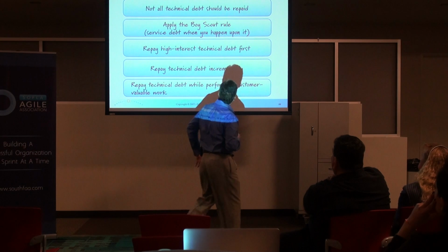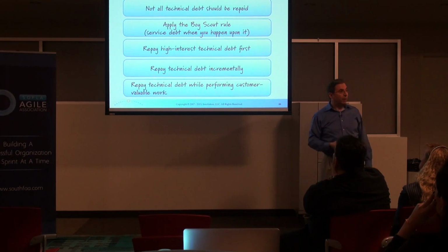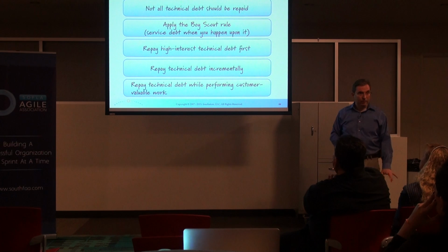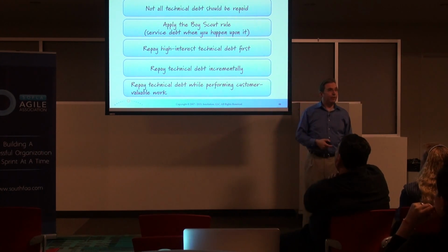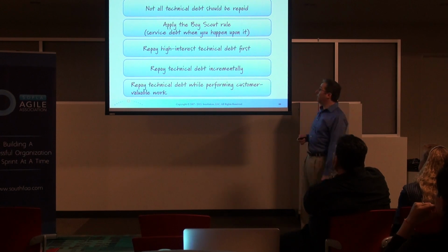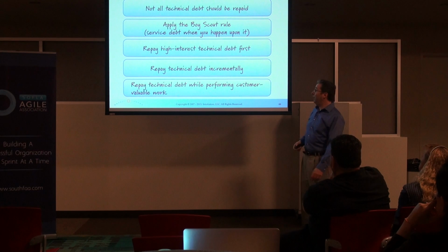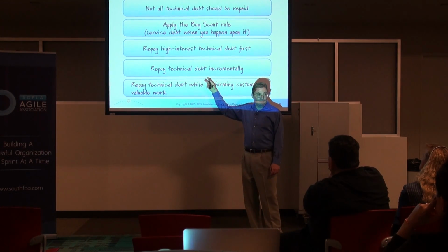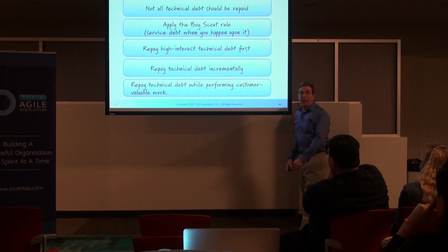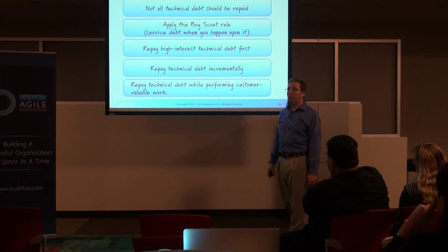All right, first, the approaches I want to talk about. Don't service all technical debt. It doesn't all have to be repaid. Come back to that in a moment. We're going to apply the Boy Scout rule when servicing technical debt. So I'm going to explain that. We'll repay the high interest technical debt before we repay the low. We always repay incrementally. And then finally, I want to repay technical debt when I'm doing customer valuable work.